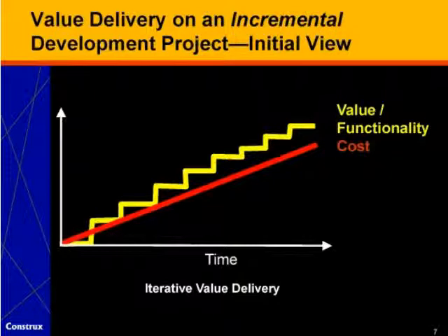With incremental development, we can do a lot of our requirements work up front, but we can still do a little bit of design, a little bit of code, a little bit of test, and a little bit of release, or at least driving the software to a potentially releasable state. And this allows us to have the value delivery line more closely approximate the cost line. In other words, when we're 50% of the way done incurring costs on the project, we can be roughly 50% of the way through with delivering value. So that is the incremental view.